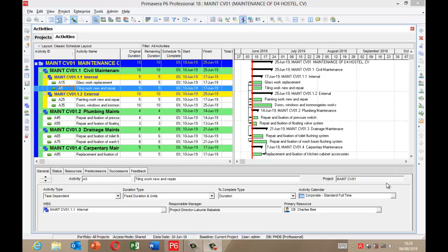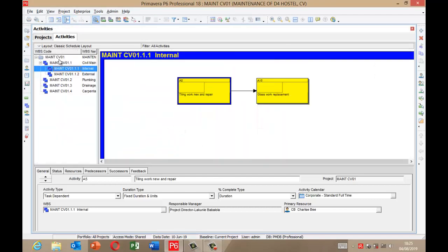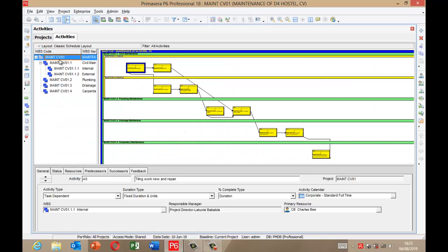You will calculate the start and finish date for the activities from the beginning to the end. When you calculate the start and finish date, you also calculate the early start, early finish, latest start, and latest finish date for each of the activities. You must have created the activity network diagram before you schedule your project. It's a step that you must have taken.